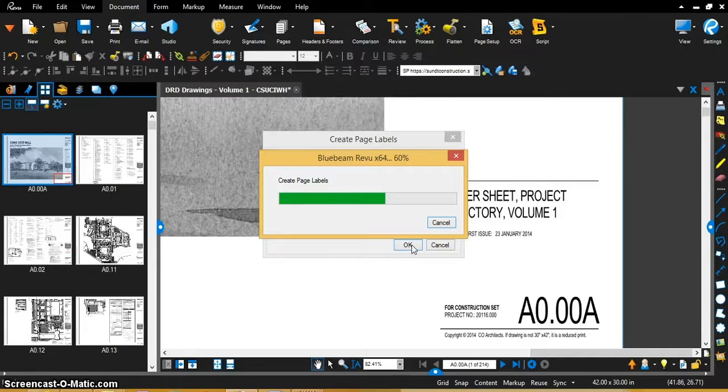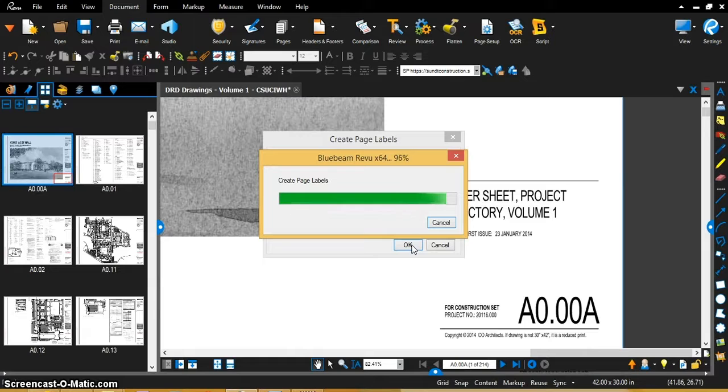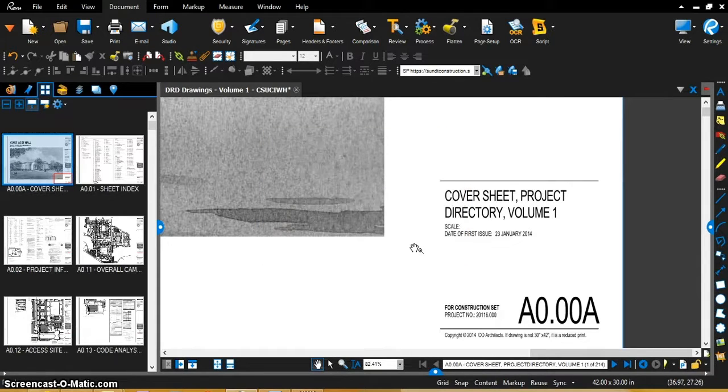When it's finally done, I'm going to show you how to export as an Excel sheet all the information that you need for a documents list. It's going to give you the order, the page number 1, 2, 3, 4, and the page number and name, which is really convenient. You can take that Excel spreadsheet and do whatever you want. You can import it to Prolog for your documents functions in Prolog, or you can simply copy and paste it onto a Sundt letterhead and send it out with contracts.